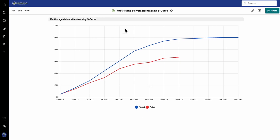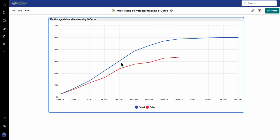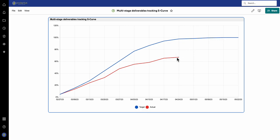So here we are — multi-stage deliverables tracking S-curve, as I've called it. What it's doing is showing what the target is for when you are planning to deliver all the various deliverables and items. You can see week by week what is due to be delivered, and finally it tops out — so on the 15th of May that is when it is 100% delivered. And where are we at the moment? Well, we can see we're actually running fairly far behind planned, and you can see the deviation there.